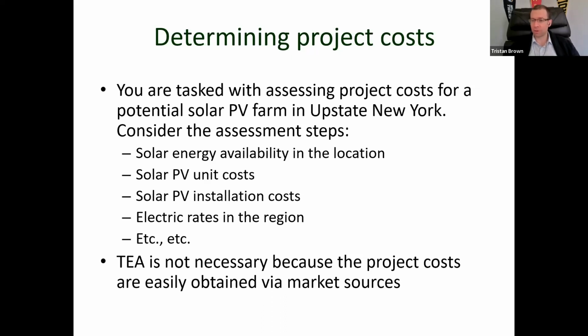So let's take the most important factor here, the solar PV unit cost. Solar PV unit cost is as simple as calling up a solar installer and asking them how much their panels cost per kilowatt, right? I mean, these are very widespread. This is a very highly commercialized technology. And so you don't need to do really in-depth analyses to understand what that's going to cost, right? Installation costs, same sort of thing. You call up an installer, you ask them what their rate is. It's that simple, right? Because they're doing these jobs constantly. And so they have a very good market rate there. So for something like this, techno-economic analysis is not necessary because we already know what these are going to be.